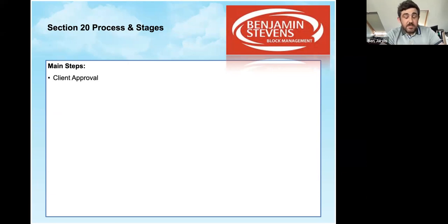First, and most importantly, if you have an RTM or an RMC, a client of any sort, a freeholder, you should go to them and discuss the project that you feel is necessary, and get that approval from them in writing to actually start putting that file together and open up any tracker or anything like that you do or might be thinking about using.